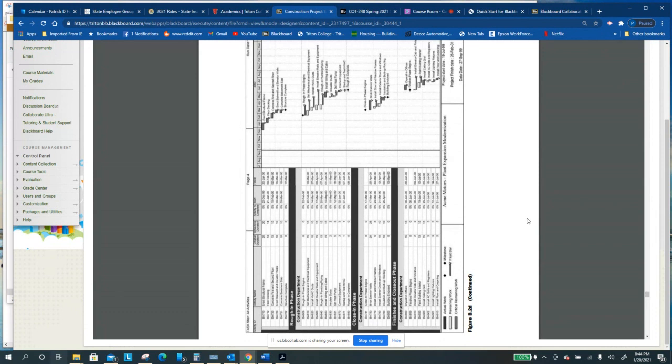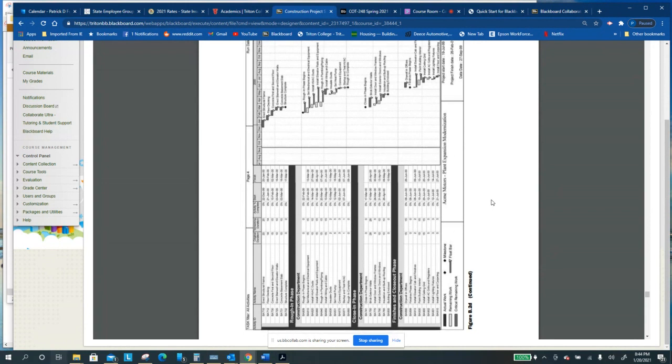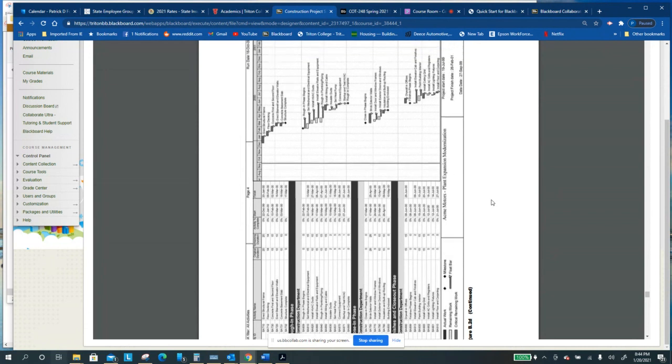Even when you have two shifts going, oftentimes a company will have an A shift, their best two guys on this crew. They have two pretty capable guys who are going to be working at night. You're not going to get the same output as you would from the two good, ace guys doing it in the daytime. If it took them 60 hours, you might end up spending 80 hours of raw time, not counting overtime, just because of the lack of continuity.